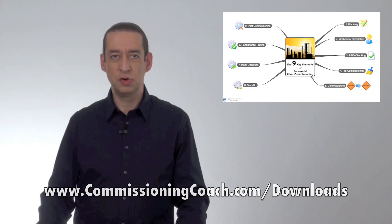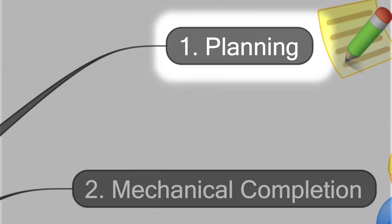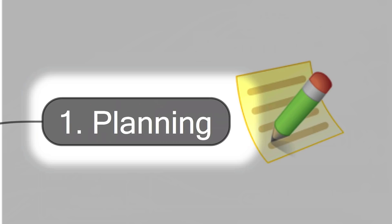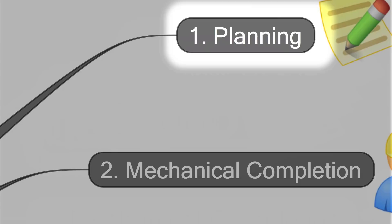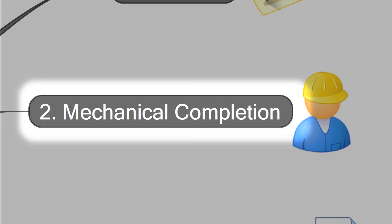The first key element is planning. Without proper planning you will not be able to commission a plant safely and in time. The second key element is MC, or mechanical completion. This is the time when the commissioning team takes over the systems from the construction team.